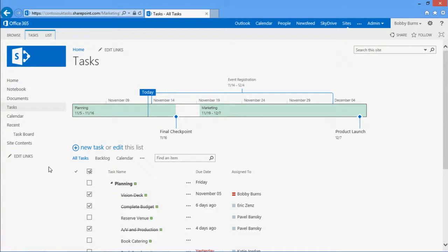Another great investment this release is the app platform that SharePoint has. And in a combination with the task management features we have, plus the app platform, you can begin to do some really, really interesting things. We on the SharePoint team are working in an agile manner. We do agile development. You guys familiar with agile? So, you have your list of key stories and user scenarios that you have in your backlog. You break those down into tasks, and then you assign them to sprints. Those sprints are a week or two. And so you're always able to fluidly change your work and whatnot.